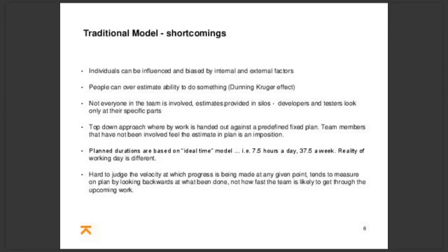Often, traditional models don't always involve all the team. Work is estimated in silos. Developers tend to give their estimates, testers give theirs, business analysts give theirs, and then this siloed approach can lead to gaps in between estimates.